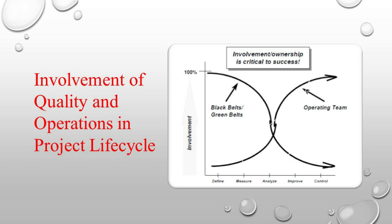Another important aspect of the control phase is the involvement of quality and operations teams throughout the project life cycle. In the define phase, the quality team should be more involved while operations provides data. As we move toward the analyze phase it becomes 50-50. As we move toward the control phase, the quality team's role should fade out, and the operations team should take charge. A proper handover plan should be made and the project handed back to operations.